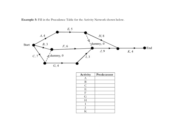Now filling in the table from the network: A, B, C have no predecessors. E has A before it. F has B — and because of the dummy, C also has to occur before F, so B and C. G has just C. H has E. I has just G. J has E, F, and I — the dummy lets E happen as well. K has J and H.